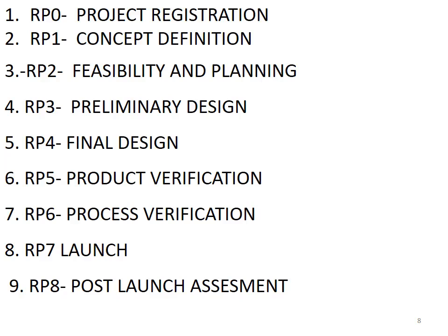So in the project registration, they define the product and the business unit needs, identify customers and market size, describe competitive features and the benefits, identify target cost and the price, identify the project risk, prepare a preliminary business case, identify project timing, how much time is available to develop this product,